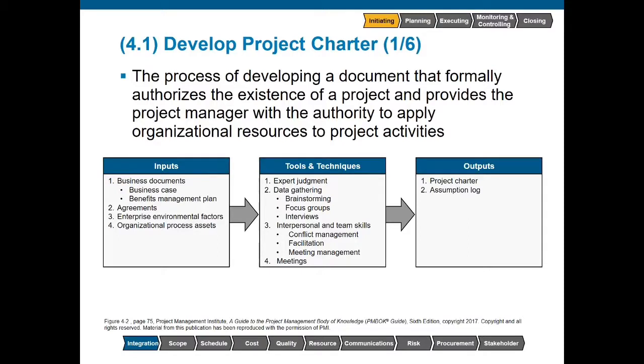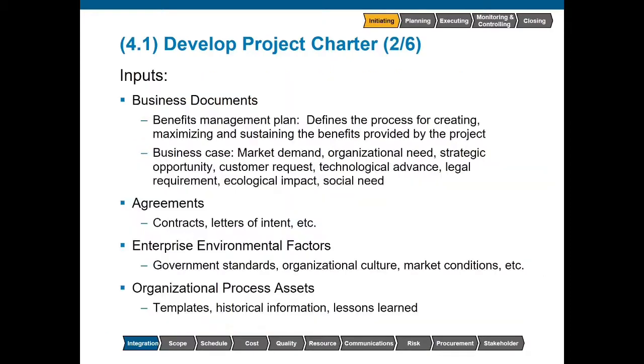The project manager is identified and assigned as early as possible in the project, preferably while the charter is still being developed, but always going to be prior to the start of planning. The charter could be developed by the sponsor or the project manager in collaboration with the sponsoring organization.